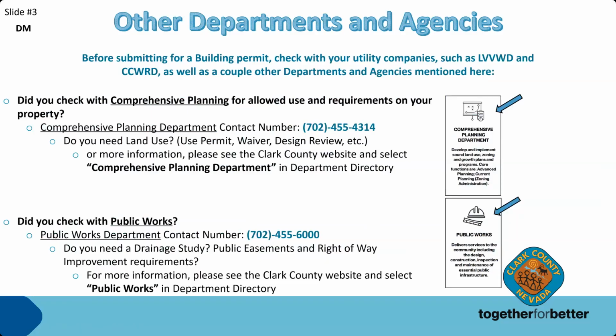The building permit process may include other departments and agencies and will require their approval prior to permit issuance. For land use information, you'll contact Comprehensive Planning at 702-455-4314. For information on right-of-way improvements, mapping, or easements, you'll want to contact Public Works at 702-455-6000.